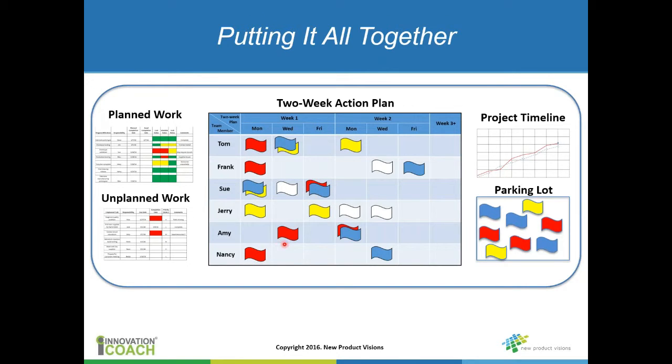Secondly, during that discussion, there are probably going to be a lot of off-topic things that come up. That's the concept of the parking lot: when you're talking through these tasks on the two-week action plan, if something comes up that's off topic but you want to collect it and think about it, you can put it in the parking lot. Maybe at the end of the normal 15-minute meeting, a couple of team members stay back and talk about that issue. The rest of the team members can go back and do what they need to do. That's a third aspect: you can carry on and have a discussion after the rest of the team members leave.